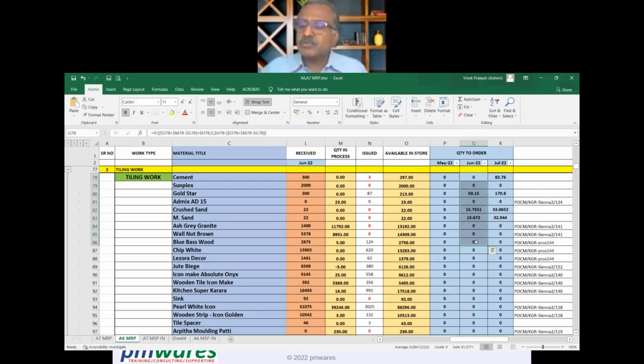So we put the requisition in time, and we take care of the time the purchase department requires for purchasing. We give enough time for the vendors to arrange things and deliver, enough lead time, and nobody is actually in a hurry as such. And how do I measure the effectiveness of this? I track one metric. I ask the purchase manager how many urgent calls you get this month.